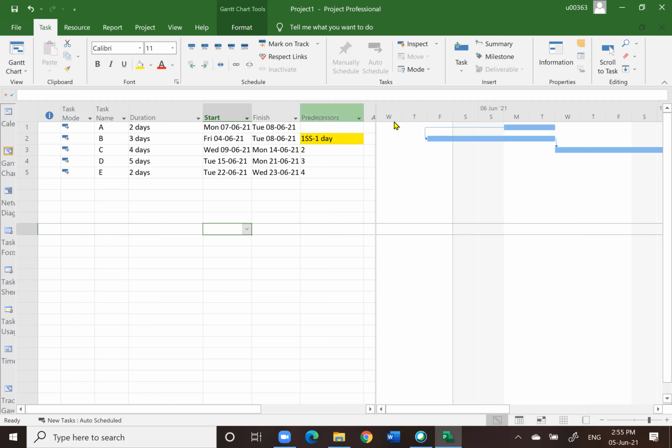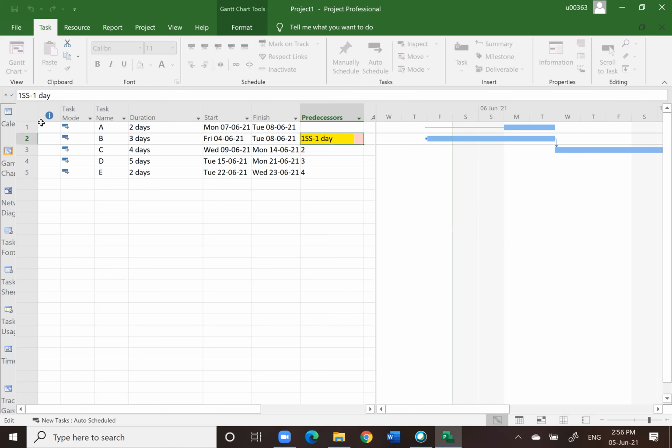Otherwise, when you want to import or copy paste into Microsoft Project, the computer would not be able to read, because the computer basically does not understand what you mean by certain things that you put. So you must put according to the right format. So let's say here you notice that there is an entry bar column here. I can change directly here. Let's say instead of negative, which is basically lead, I want to change into positive. Positive meaning lag. So what would happen?